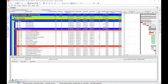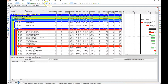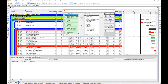Now I want to organize the columns in the order we want: Activity ID, Activity Name, Original Duration, Man Days, Remaining Duration, Early Start, Early Finish, Late Start, Late Finish, Total Float, Budgeted Total Costs, Physical Percent Complete, and Earned Value Cost — in that order. If not set up that way, just go to the columns and select the columns you want to pull over.